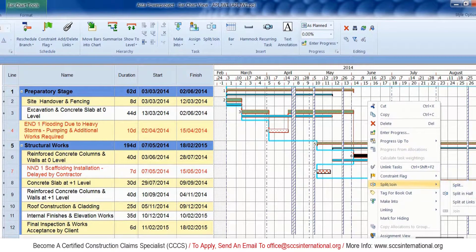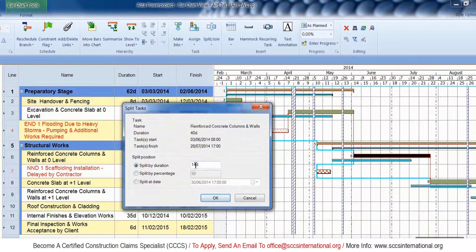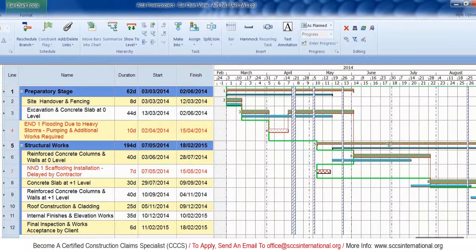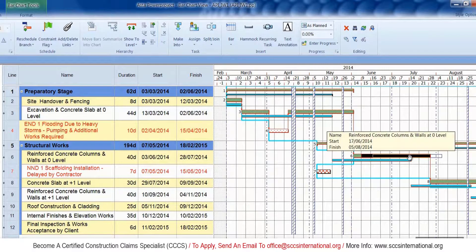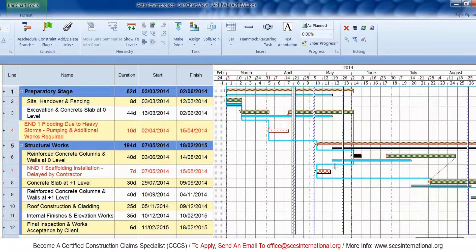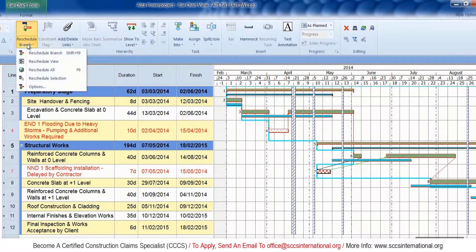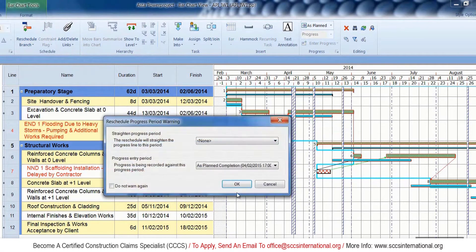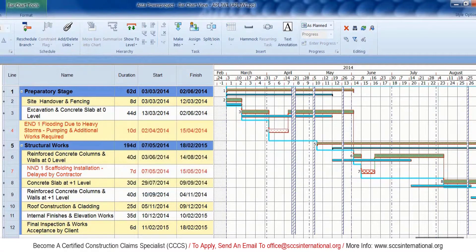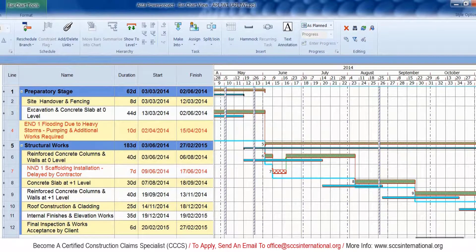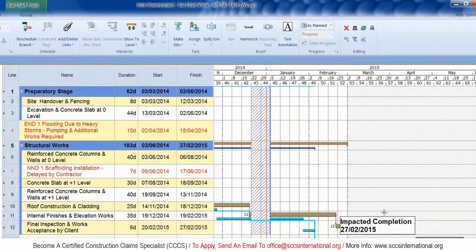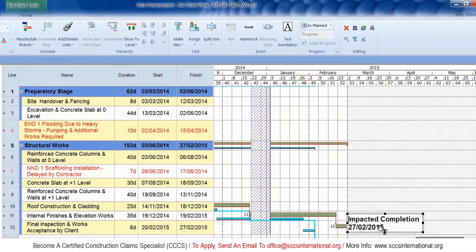Before you split the affected activity, please make sure that you get the duration correct — refer to the Excel file to get the correct start and finish dates for the delay event. Now insert the delay event into the split activity using finish-to-start relationships and reschedule the project. You can see that the program has been critically delayed as a result of this new delay event.